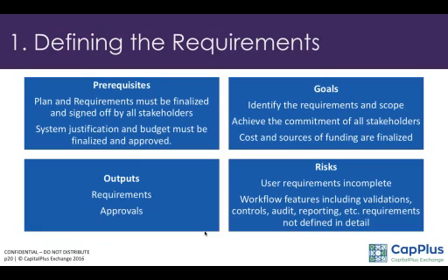percentages, calculations. All the calculations that you want have to be defined in detail, because that's the document that the vendor is going to look at and say, I'm going to deliver this. And you can always hold the vendor responsible or accountable to deliver that as per the contract that you have signed. So if you have defined all these requirements, then it makes life easy during the project process, or during the project management of the whole cycle.